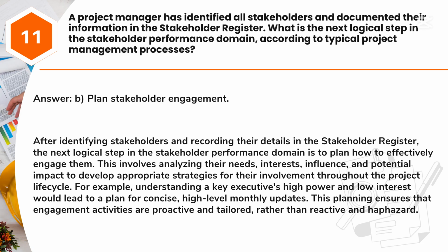This involves analyzing their needs, interests, influence, and potential impact to develop appropriate strategies for their involvement throughout the project lifecycle. For example, understanding a key executive's high power and low interest would lead to a plan for concise, high-level monthly updates. This planning ensures that engagement activities are proactive and tailored, rather than reactive and haphazard.